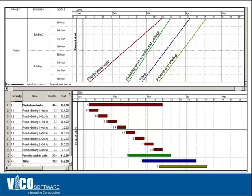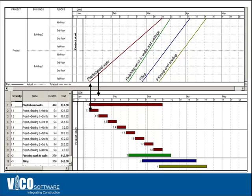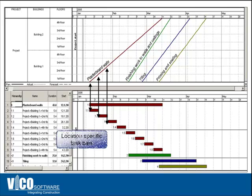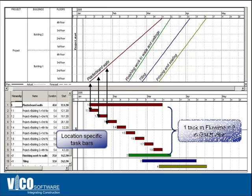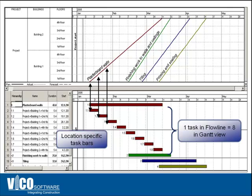The flowline view can also be displayed in a Gantt chart view, so the two are compatible. It's not just that you're working in a flowline view or in a Gantt chart view, you can work in both at the same time. But as you can see, the number of activities that you have to manipulate in a flowline view are a lot less compared to what you have in the Gantt chart view.